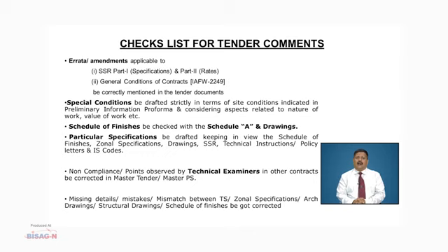Special conditions are to be drafted strictly in terms of site conditions indicated in the preliminary information proforma or PIP, and considering aspects related to the nature of work, value of work, etc. The schedule of finishes is also a critical part and has to be checked along with Schedule A and the drawings. The particular specifications have to be drafted keeping in view the schedule of finishes, the zonal specifications, the drawings, the SSR, the technical instructions and the policy letters and the IS codes.